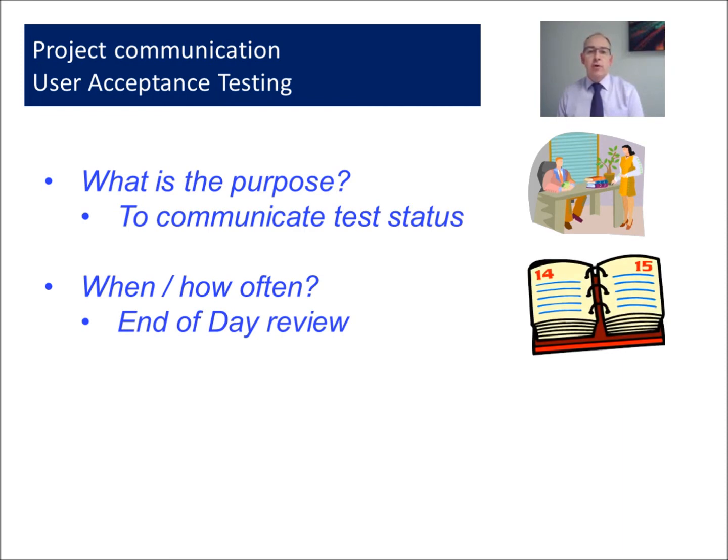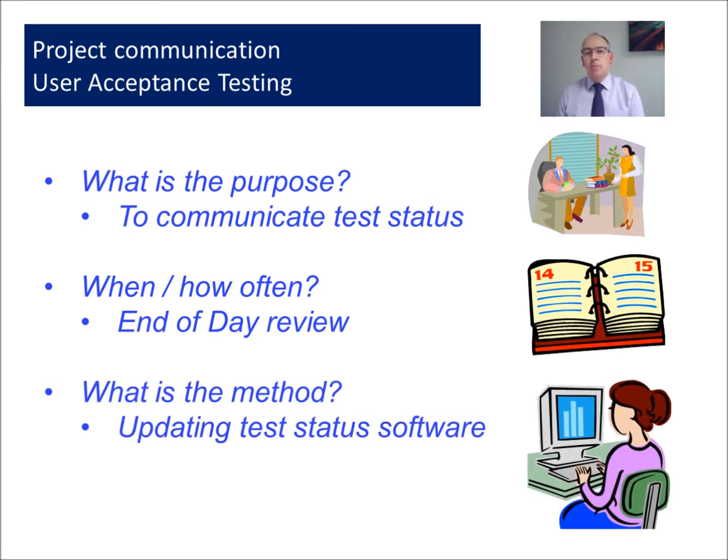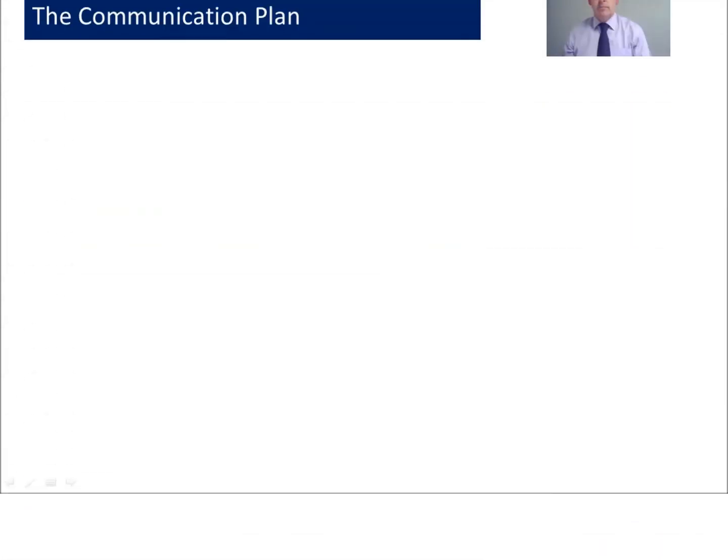It's an end of day review. We can't wait till the end of the week. And the method we're going to apply here would be to update the test status software, not to ask for verbal feedback, but to get individuals to update a piece of software which collates all the UAT results.